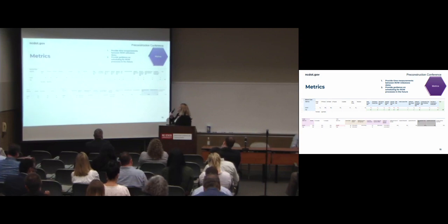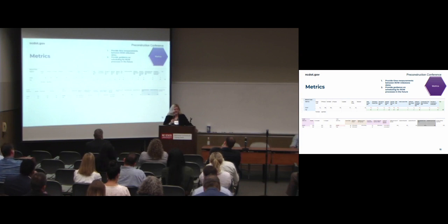So what we've done, and what I didn't put up here because we actually have a live sheet right now that we're running, we do metrics on how long it takes Central Right-of-Way to pay a payment. So when the field sends in a final report to pay a property owner, we've agreed, we've settled, or we're getting ready to condemn, how long does it take us to do our job? And we broke that down into not only how long does it take for the process, but how long does it take for each person that handles it. It took a long time, and Robert Woodard's here today. He was a big part of that effort.